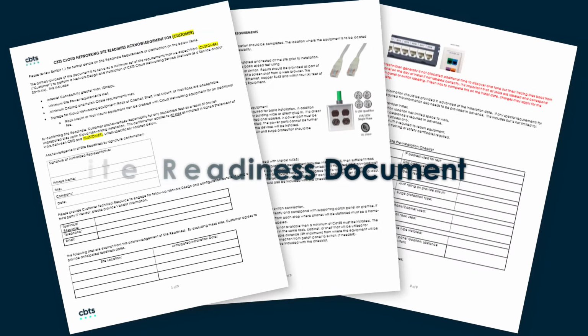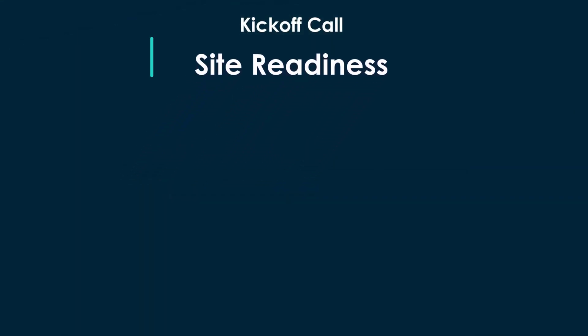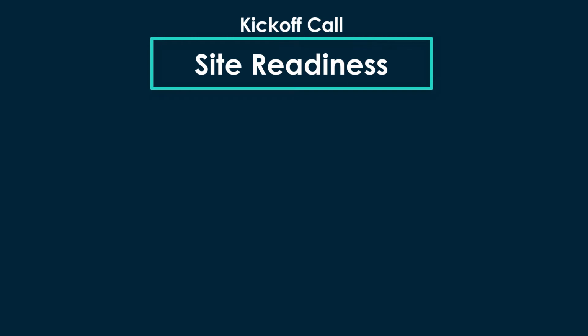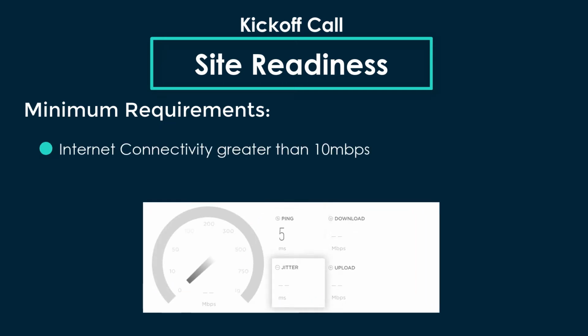Please refer to your site readiness document included in your service agreement, which ensures that you've met the minimum requirements needed to complete your network design and eventual installation. Prior to your kickoff call, you will need to ensure and acknowledge the site of your installation meets these minimum requirements. Please ensure you have adequate internet connectivity installed and tested.